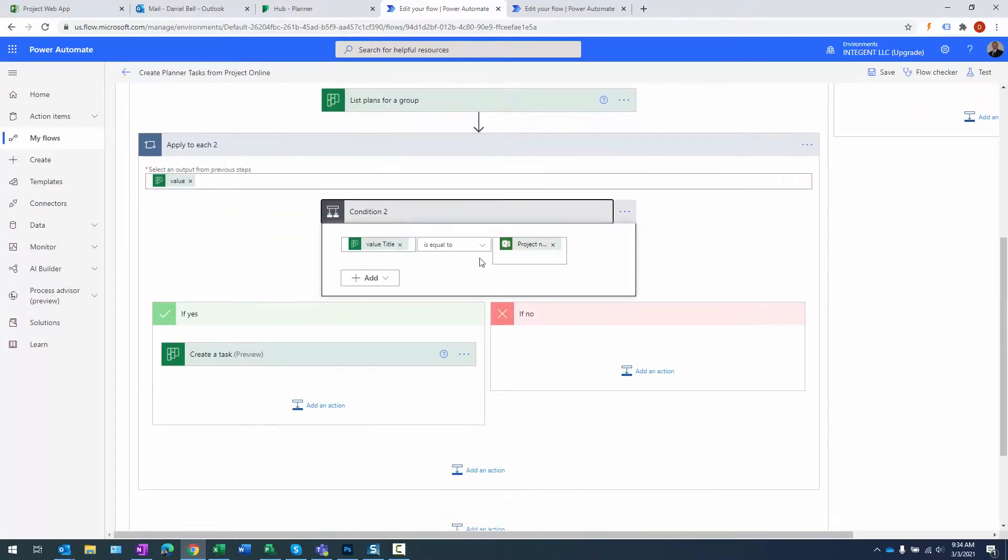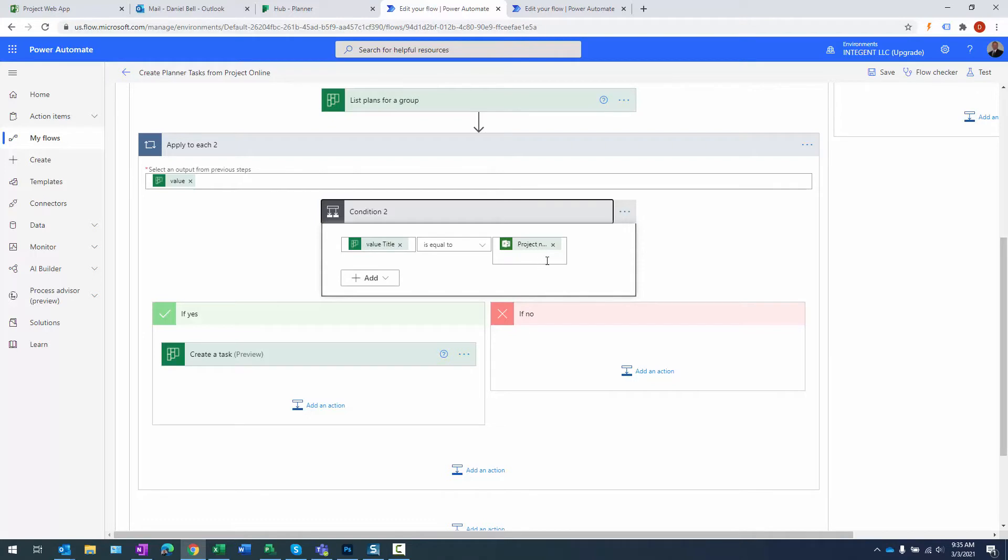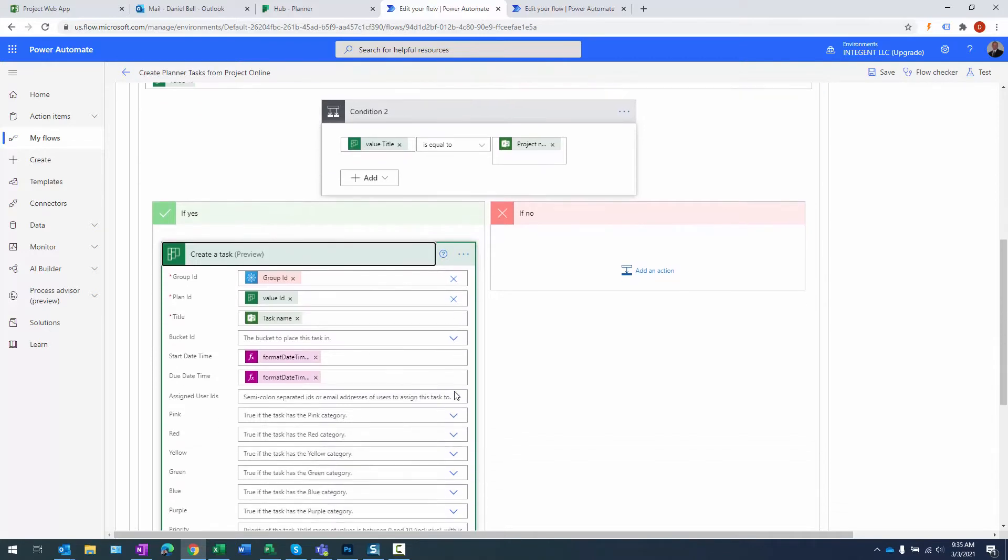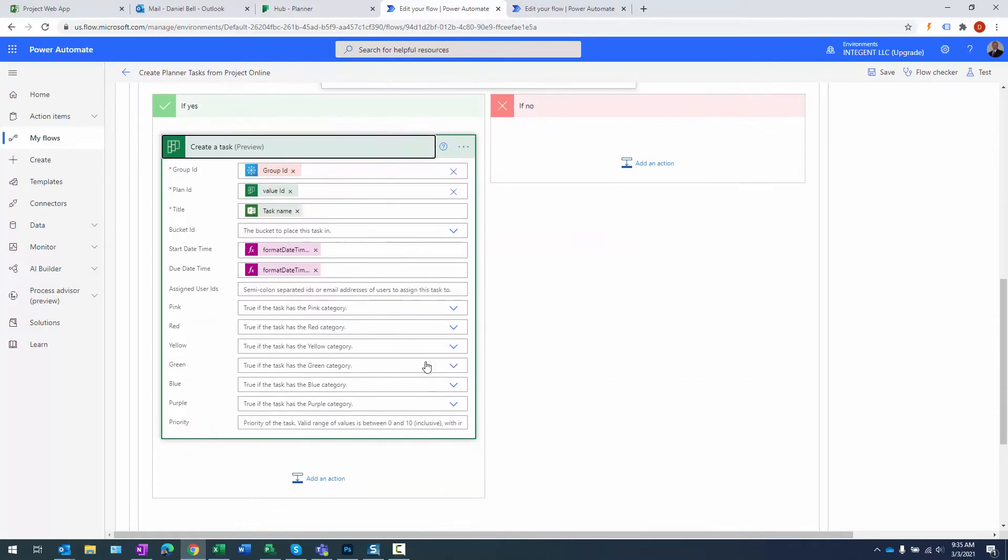I go ahead and with the value that's returned from list plans from group, I try to match the title of those plans that are under that group to a project in Project Online, in the current project that's publishing, because that's when this whole flow is going to be triggered off. When that actually happens, when we find a plan in planner that has the same name as the project in Project Online, it basically uses the create a task action here.